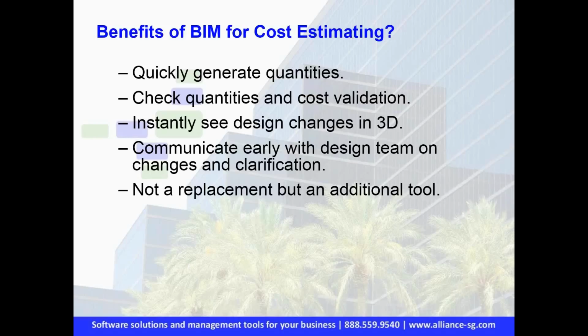The important thing too is that a lot of people think this modeling concept, the whole BIM, is the replacement for everything that you're doing out there. No, it's just another tool. It's like using a 2D tool like On-Screen Takeoff. It's another way of check-validating your estimate: where's the model as it relates to numbers coming in from sub-bids and my own internal numbers that I'm checking. Your estimate is going to be as good as how that model is, much like a set of blueprints. Blueprints will never be the final number, but it's certainly a good start, and you've got to incorporate the other things that are eventually going to be there.